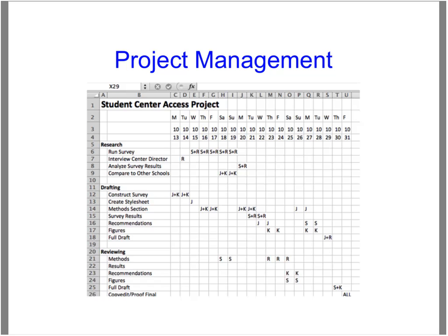Now, Gantt charts in writing projects are a really powerful form of information visualization. They allow everyone on the team to see what's going on, including aspects such as fair division of workload over time. Students can also be taught to apply a little bit of critical assessment. Is the work being divided up evenly among the team members? Is there hidden effort? For example, does allotting 5 days to running a survey really require 5 times as much effort as interviewing the center director?